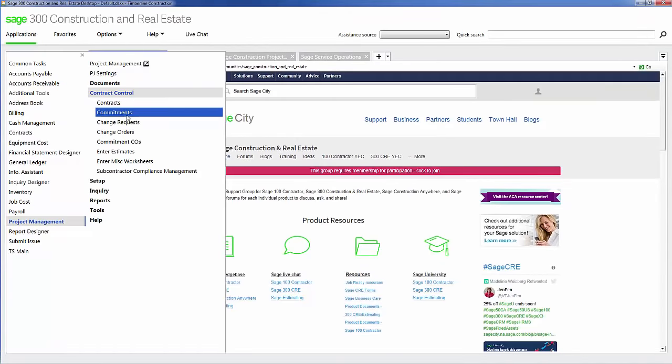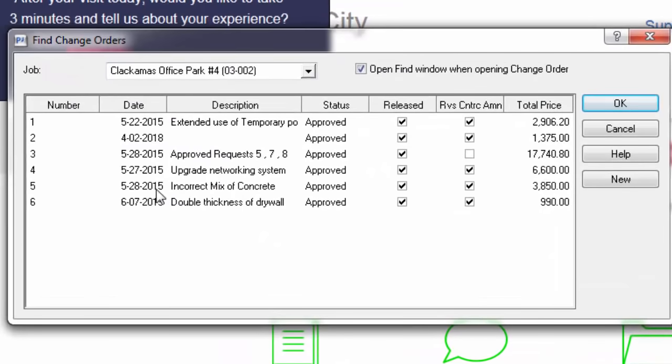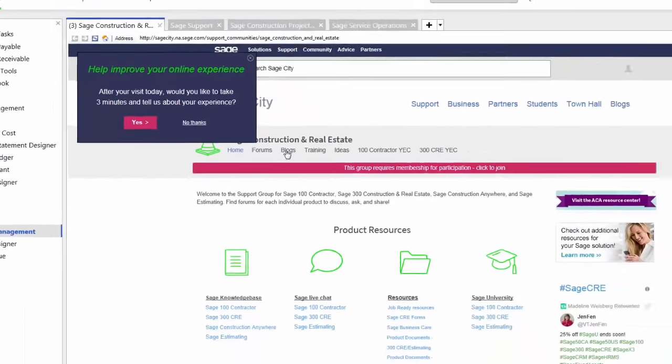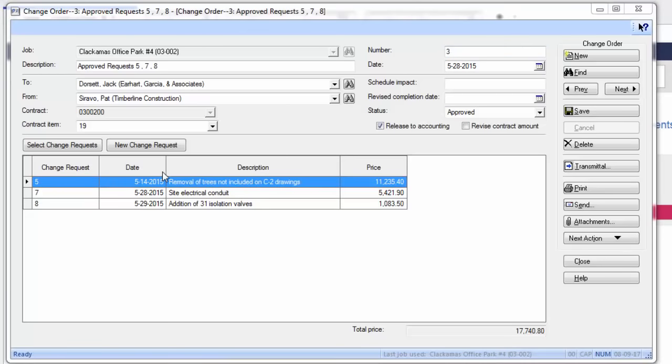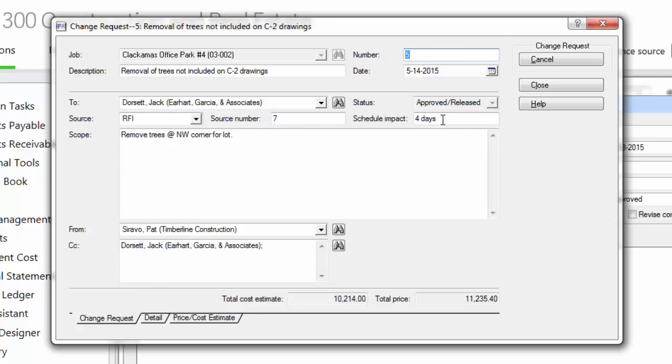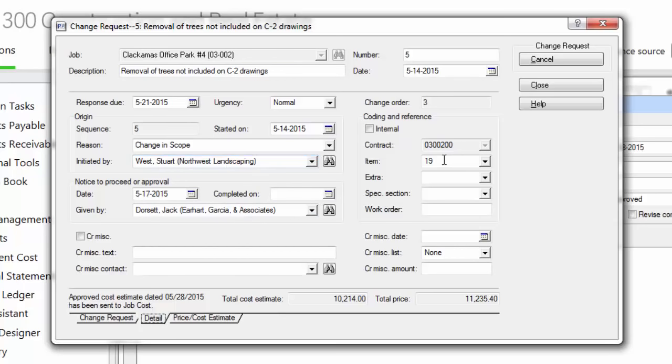So let's see how a change order works. I'm going to open up a change order here for Clackamas office park, and here I'm going to pull this change order number three. As you notice here, there are three change requests that are added to this change order. The way the software operates is my customer requests that I give them a price on a change. I then create a change request for that particular request. In this example, the customer asked to remove some trees at the northwest corner of the lot.